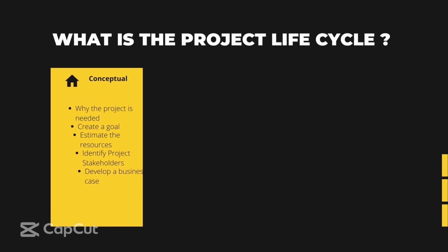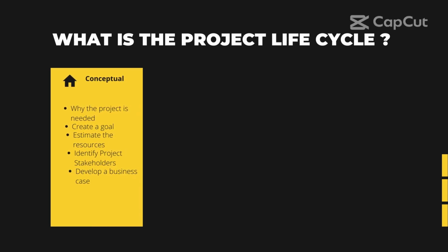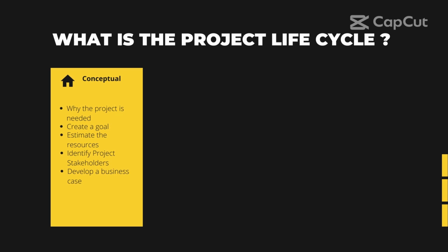The conceptual phase is the phase to determine why the project is needed, create a goal, estimate the resources that we'll use in executing the project, identify the project stakeholders, and develop a business case.